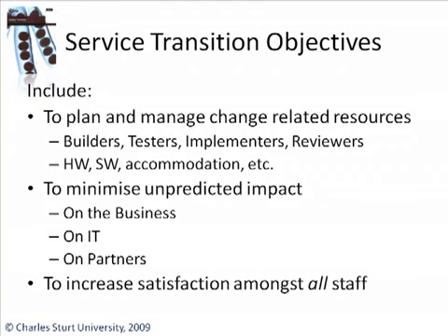And there's nothing worse than being in a scenario where the hardware has arrived, the people are there to do the work, but the software, for whatever reason, hasn't arrived as yet because someone forgot to place the order. And that means in the end, we can't actually roll out the service to the customers.